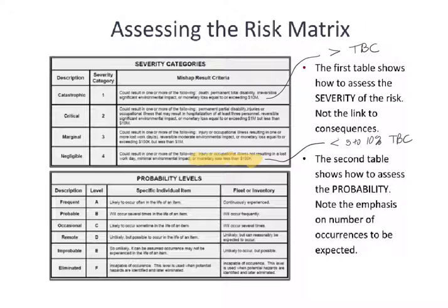If it's an irreversible environmental impact, something that you could not reverse or you don't know how to reverse it, that automatically falls into the catastrophic category. And obviously, that type of severity can have massive financial impact associated with it. Loss of a life can result in major lawsuits, major impact on the company, major loss of reputation. So it's hard to even get to a monetary figure sometimes, but in this standard, they're saying exceeding 10 million.